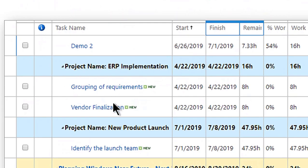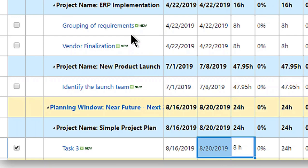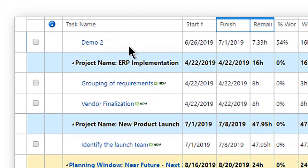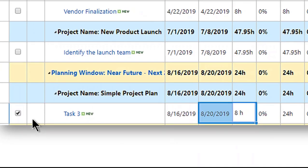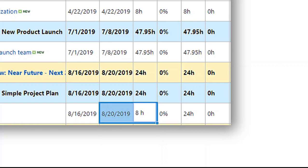This maintains confidentiality and it also makes it very convenient for project manager. Because today, half the project manager's time is going in informing people and asking people, what did you do? What is the progress? People just don't respond. Now, not only can I see my task, if I finish a task, I just go here and I say how much percent complete or I can say actual hours which are spent on the task. If you are in IT or where time is billable, you can also create very sophisticated timesheets where you can capture hourly work and then allocate it to relevant tasks. Both ways is possible. Here, I'm showing you task level.